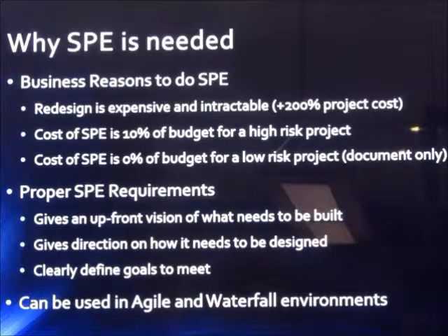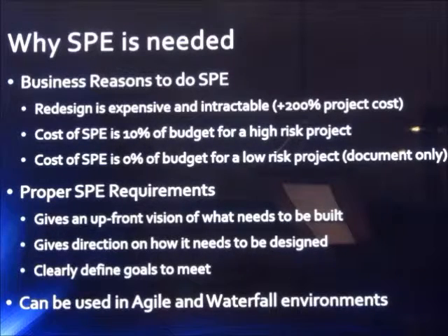Proper SPE requirements, getting those goals done at the beginning of the project, actually give you a real good chance of knowing what needs to be built. Okay? Finding that little seed, like I said, with radiologists, it's that 250 milliseconds that we have to hit. If we didn't know that up front going into that project, we would have been toasted by the end of it, because we were doing CT scans, which were 2,000 pixels by 2,000 pixels. What we ended up doing was compression algorithms that gave them low resolution first and high resolution over a period of about 20 milliseconds. It wasn't perceptible to the human eye, but it allowed us to do the algorithms better.